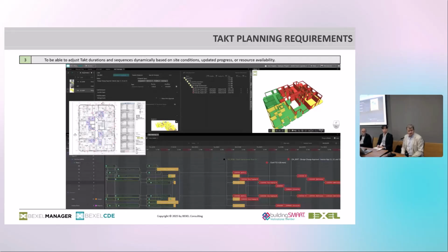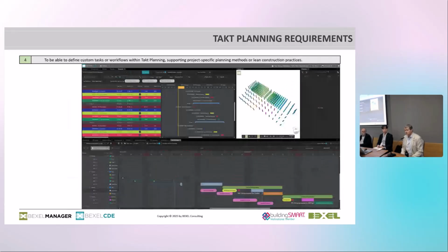Okay, what we also want is to add all missing tasks to the task planning. A lot of times barriers or any safety things are not in the Gantt chart, but I want to have this information on site. So we need to add a lot of additional details on site. And I will show you some integration.